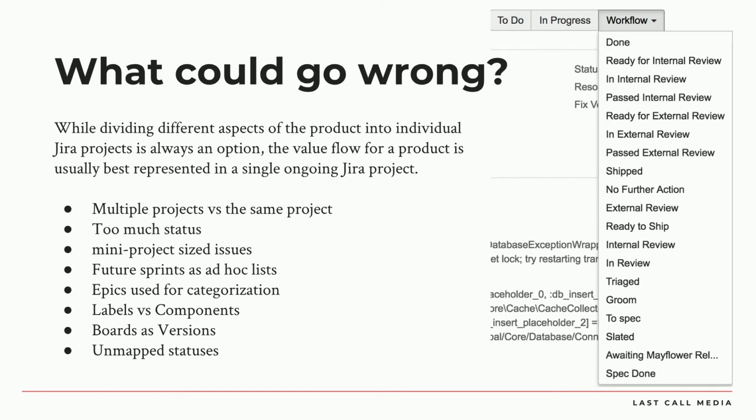So you could have multiple projects, and then what you're going to need to work on is the interoperability between the different issue types and the different workflows. And the trick there that you'll want, if you're the Jira admin, or if you're looking for a common core configuration, is when you create a new project, to share the configuration of another project.